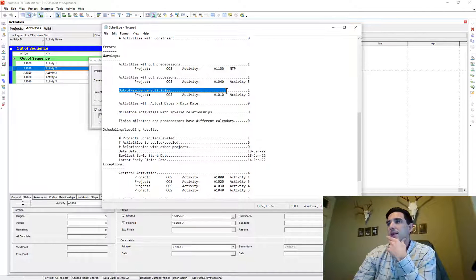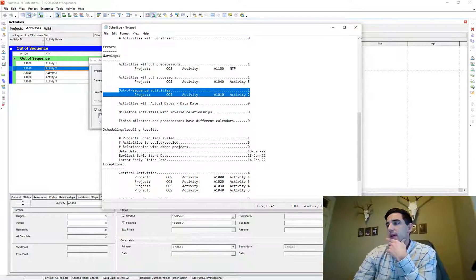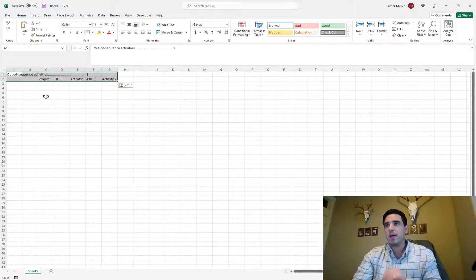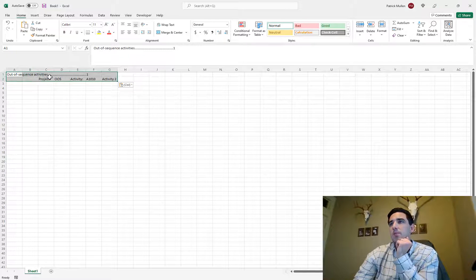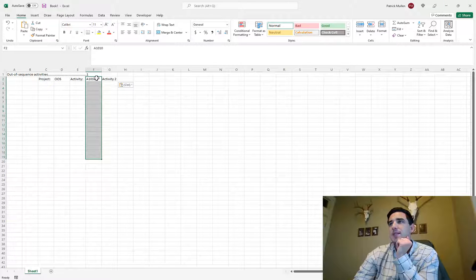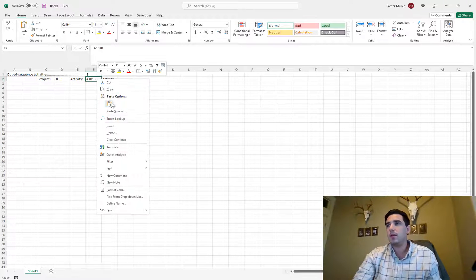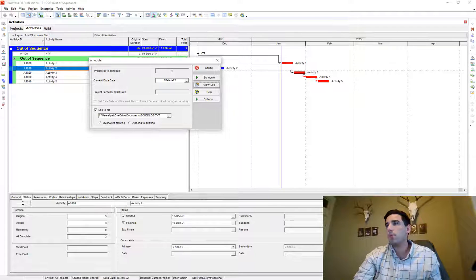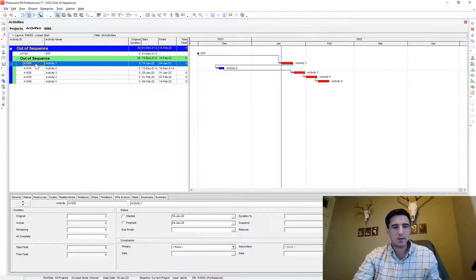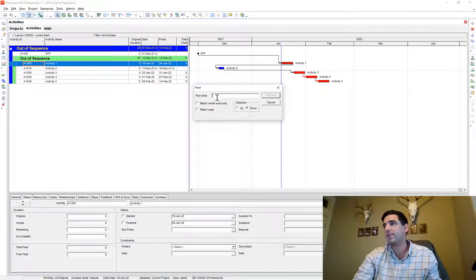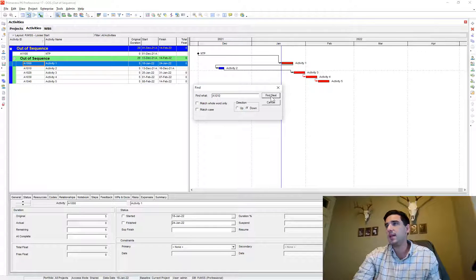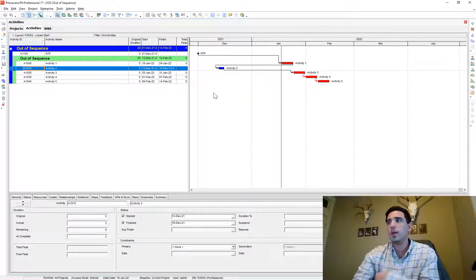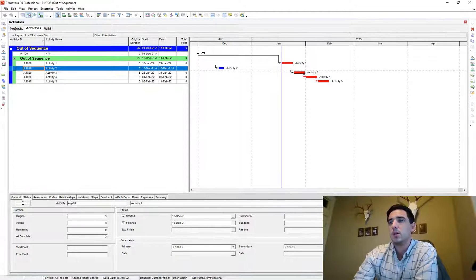And what I do is I copy this information and then I'll open up an Excel file and I'll just paste it into Excel and it'll create that list of activity IDs. And what I'll do is just one by one, I'll just copy that activity ID. I'll go back to my P6. I'll close that out. And then I'll do control F and I'll just paste that activity ID and search for that instance.